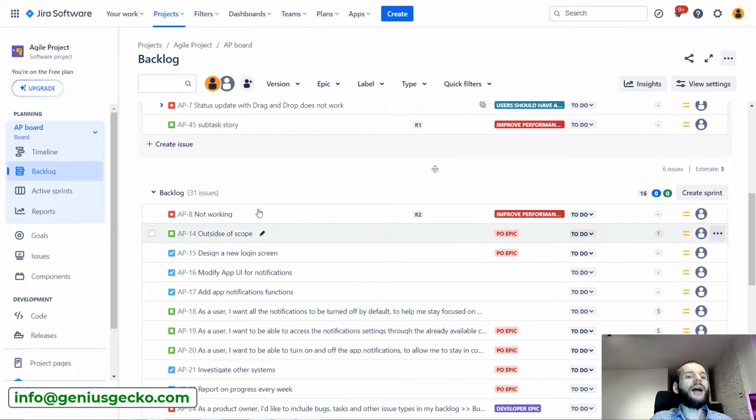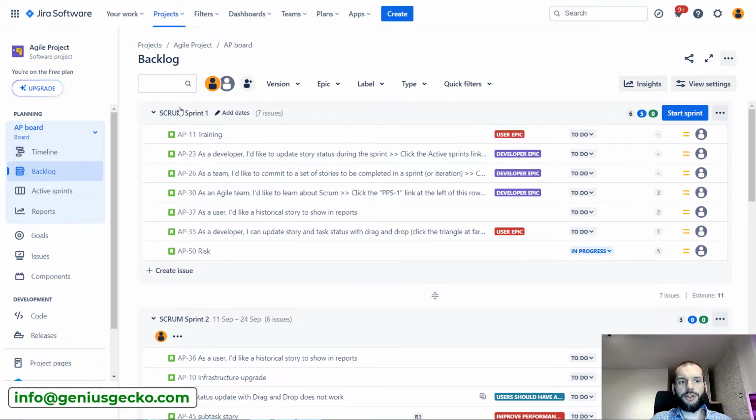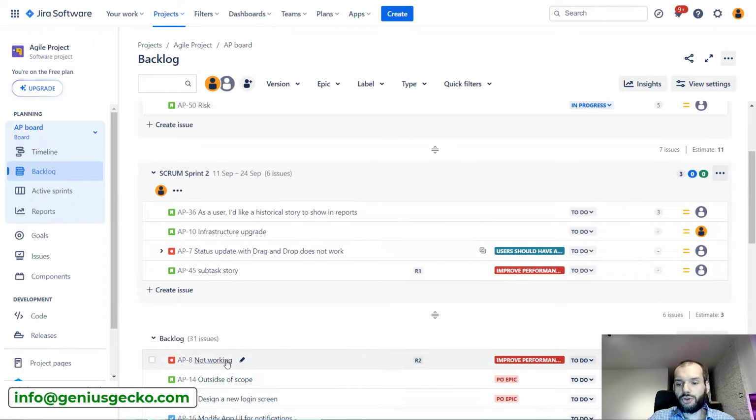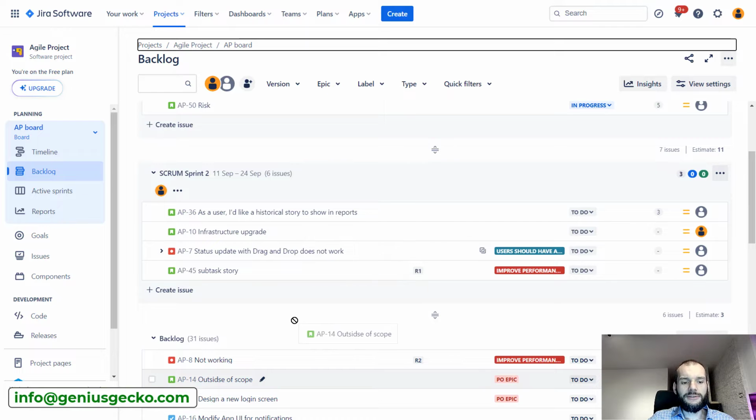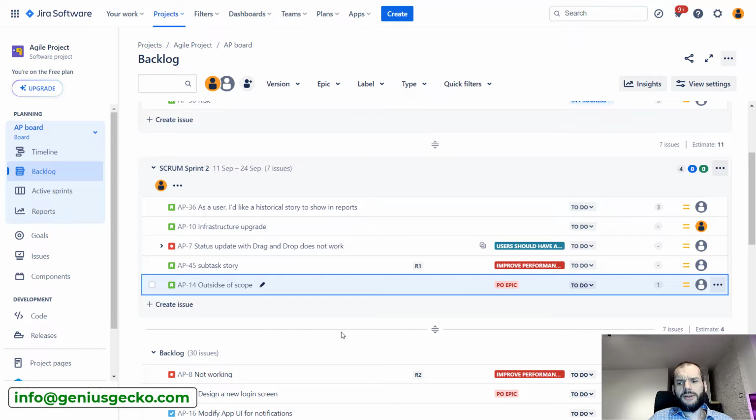So when an issue is in the backlog, the team estimates it with story points and then puts it into a sprint. You may have several sprints over here and basically drag and drop the issues that you want to deliver in a specific sprint. Like that. So we already have a list of tasks to be done in our backlog, and we can put them in the sprints. Sprints are time boxed, so we know how long they are, and thanks to that we should know, with time, how many story points we will be able to deliver in each sprint, which is basically called velocity.